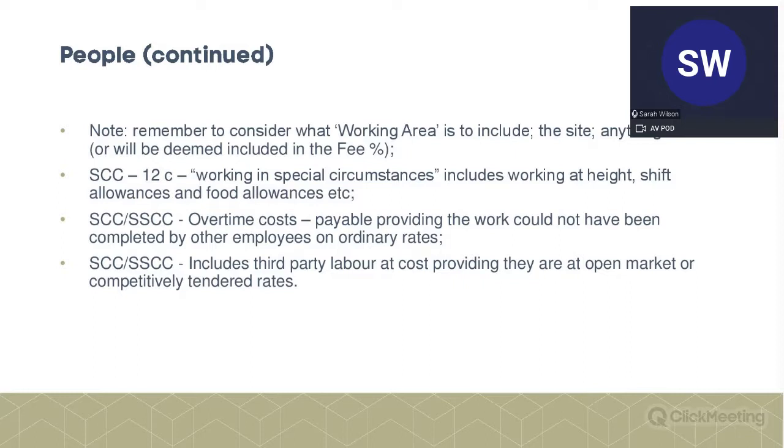Some people like to put their head office in as a working area, so that basically anybody who's working in the head office on the project can claim their costs as people. Otherwise, as it says, it's deemed to have been included in the fee percentage. Now, if your office is covered as the working area, I suspect your fee percentage would need to be substantially less than it would normally be. Otherwise, if it's a tendered situation, you're not going to be particularly competitive.